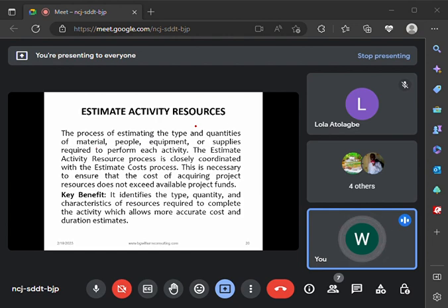So now every estimation of your resources, and remember that is why I mentioned earlier that the WBS is a great deal for you. Achieving the WBS and breaking the work package down to activities solves a lot of problems. So it becomes easy to estimate the number of resources you need to complete a particular activity in terms of the type and the quantity that you need. Example,